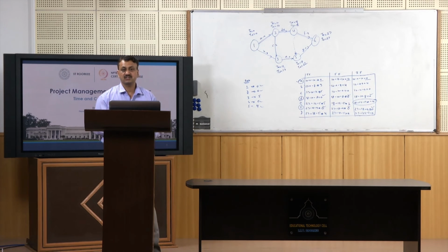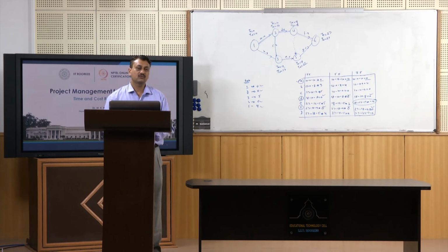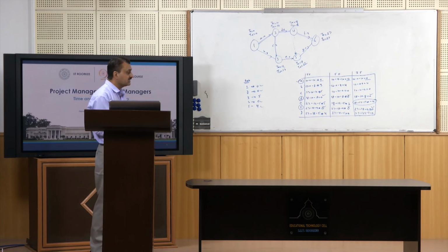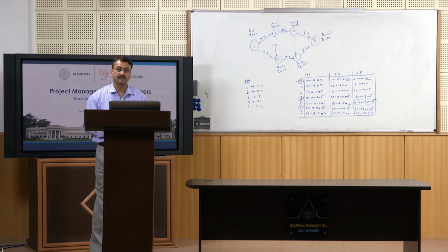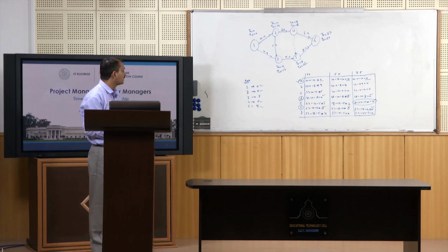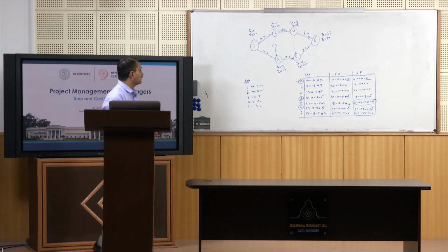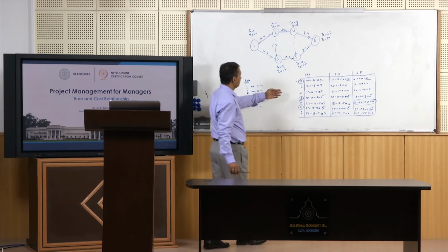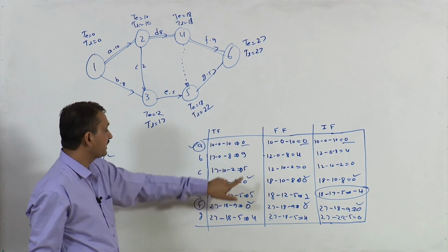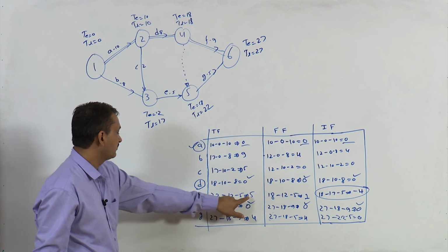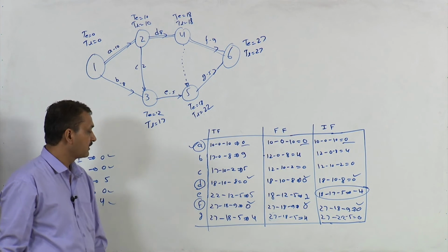The first application is you can know which non-critical activities you can delay, because when you delay a critical activity, you will also be delaying the duration of the project. So you can delay all these non-critical activities, by 9, 5, 5 and 4 respectively.